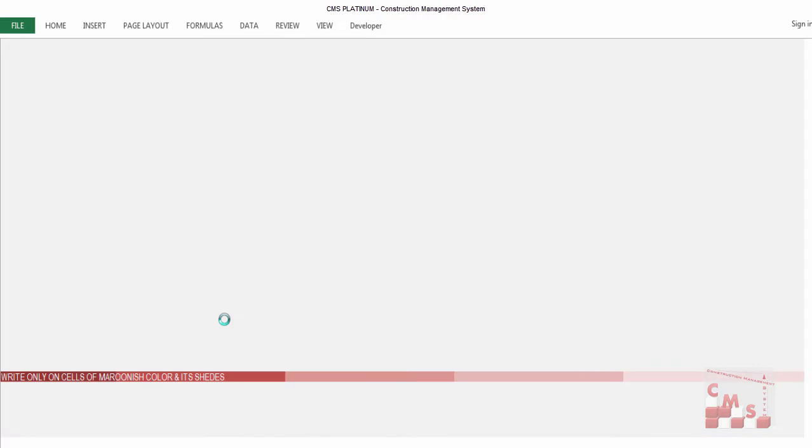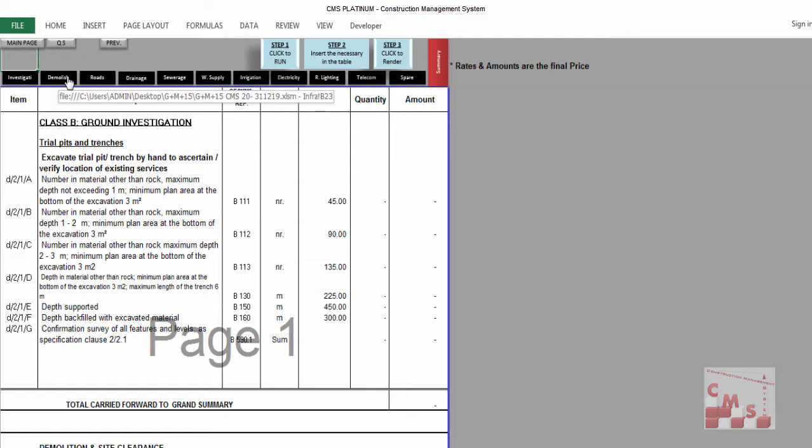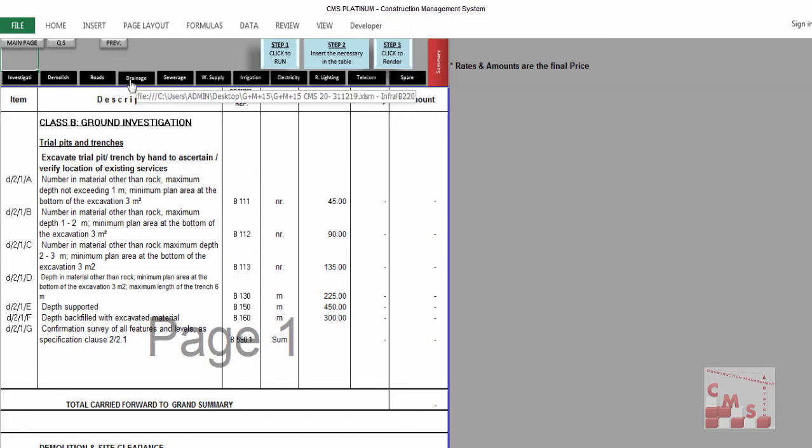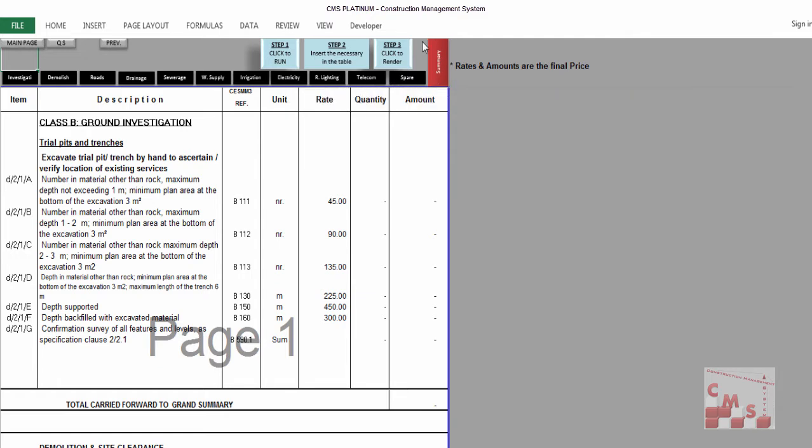CMS will guide us for a full POQ of infrastructure work, which is starting with soil investigation, demolishing for the existing road construction, drainage, sewage, water supply, irrigation, electricity, road lights, telecom, and spare parts. At the end, we'll find the summary.